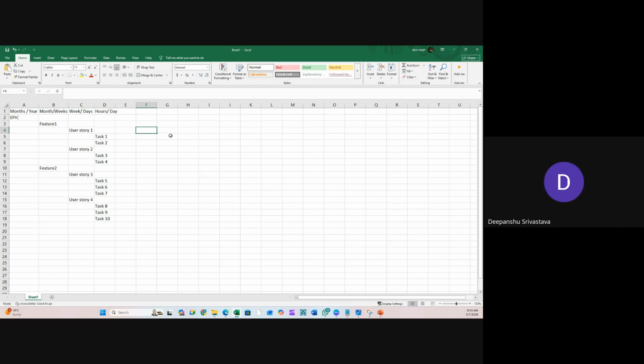Sir, in Jira we generally have epic, then user story, task, subtask. So the feature is kind of relatable in Jira. Like, feature in Azure DevOps is equal to user story of Jira, is my understanding. See, whatever sequence you can decide, but normally if I'm planning to go with the out-of-the-box work items available, here the top level work item is epic, then feature, then product backlog. In Jira it used to be called a user story, but here it is called the product backlog.